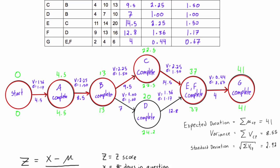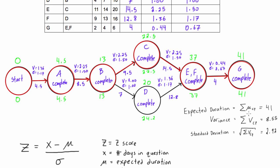We've been working on this for a couple of videos. What we learned from this network diagram is we were able to figure out the expected duration of the project was 41 days. It had a project variance of 8.55 and a standard deviation of 2.92.